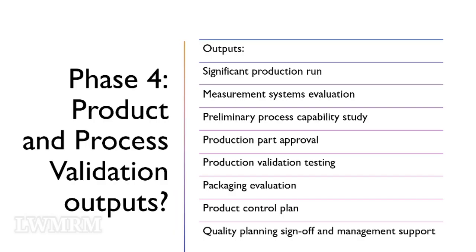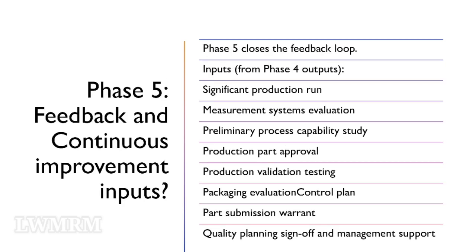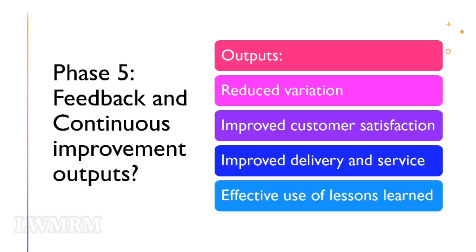Phase 4 outputs: significant production run; measurement systems evaluation; preliminary process capability study; production part approval; production validation testing; packaging evaluation; product control plan; and quality planning sign-off and management support. Phase 5 — Feedback and Continuous Improvement — closes the feedback loop. Phase 5 inputs are from Phase 4 outputs: significant production run; measurement systems evaluation; preliminary process capability study; production part approval; production validation testing; packaging evaluation; control plan; part submission warrant; and quality planning sign-off and management support. Phase 5 outputs: reduced variation; improved customer satisfaction; improved delivery and service; and effective use of lessons learned.